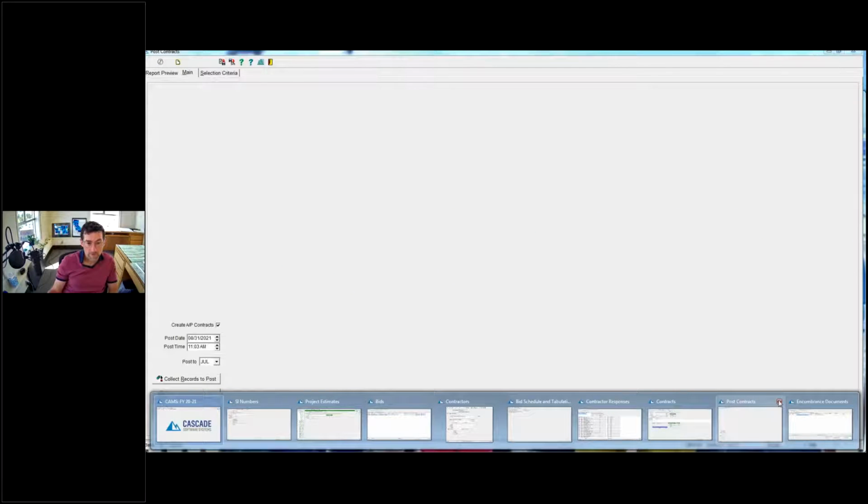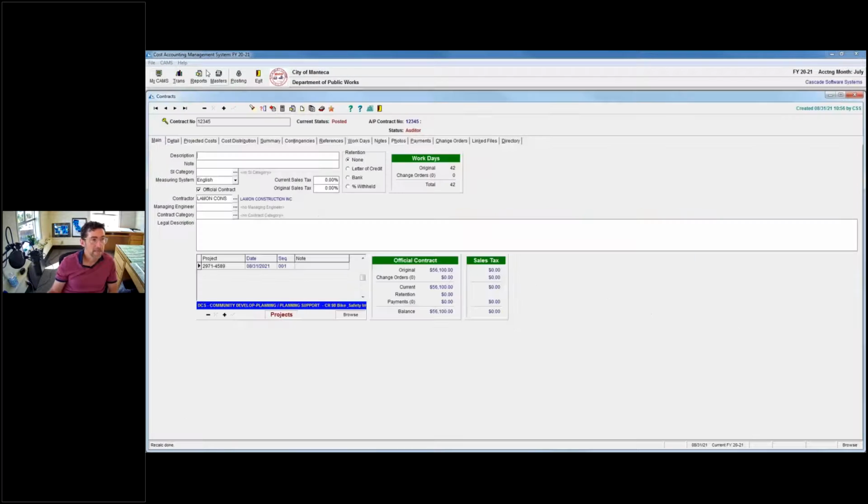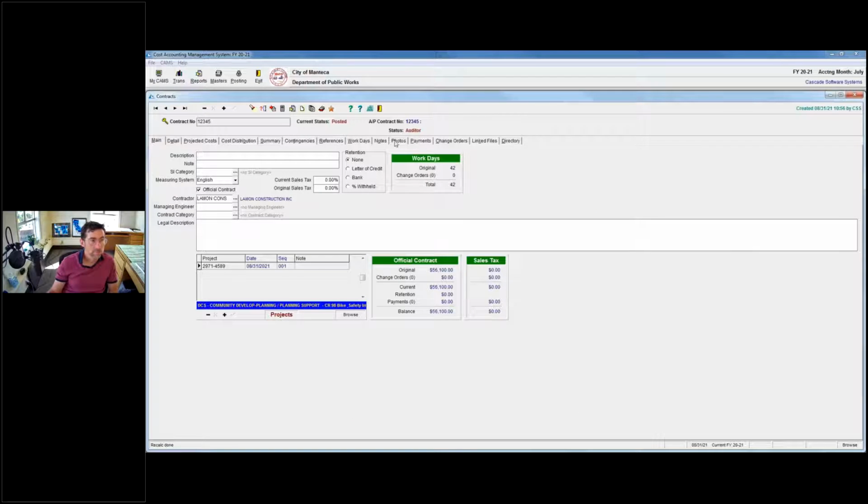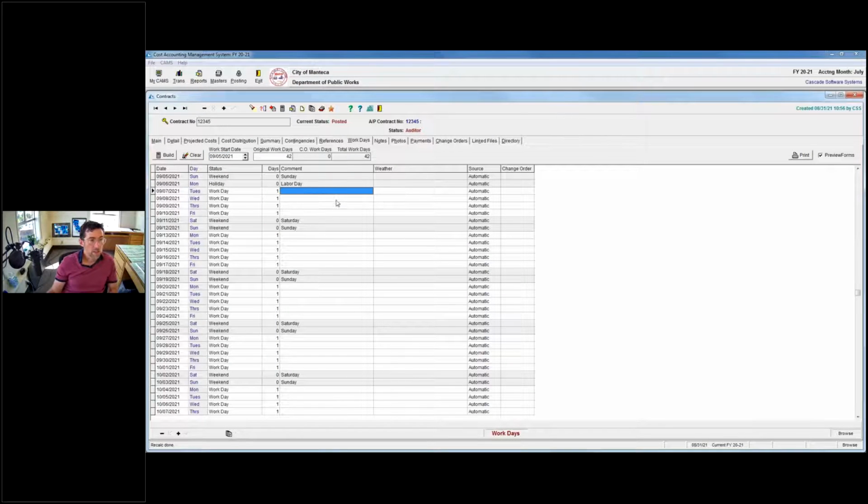now I want to work what I call working the contract, and the main ways we do that are through filling out our daily work journal, right? So we say, okay, you know, started work, I don't know whether you want to put in weather, you know, couldn't work, and the weather was rainy, and so we set that to a 0, right?